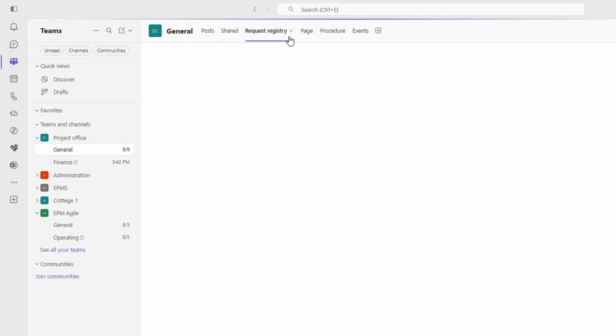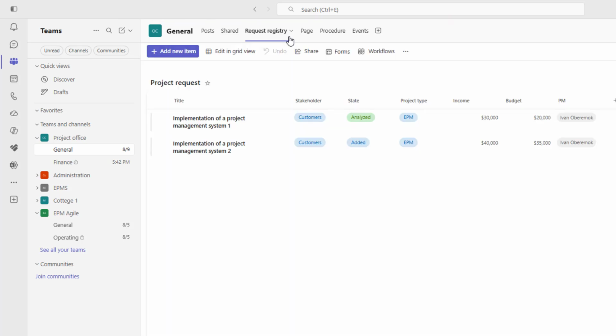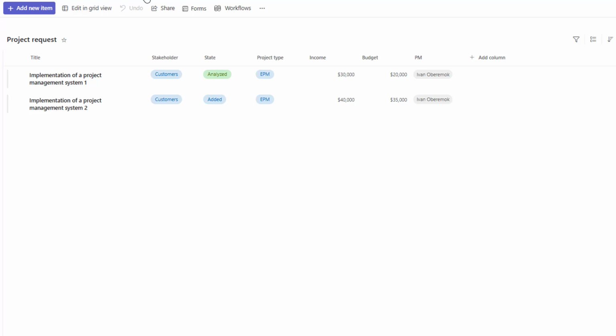Once the team is ready, the next step is to collect all your projects. I suggest creating a project register. This is a place where you store information about past, current and upcoming project ideas. Later, you will use this list to efficiently launch new projects.